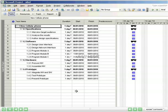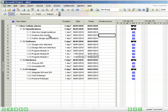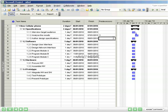With a copy of the network structure close by for reference, I will begin to enter the information in the predecessor column in Microsoft Project. Notice that 'Interview Target Audience' is our first task and does not have any predecessors. However, if we move to the next task, 'Analyze Results,' it is fairly obvious that we need to have interviewed the target audience first. The way to enter this is to put the task ID for the preceding task in the predecessor column. So I'll put a 3 in the predecessor column. You'll notice right away on the timeline view that it has moved the start of 'Author Design Specifications' out and made a connector — the relationship is being established between task 3 and task 4.